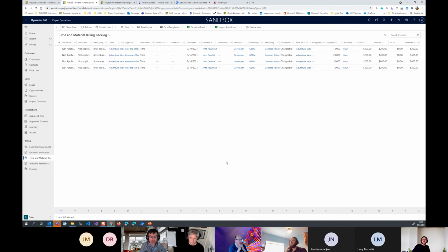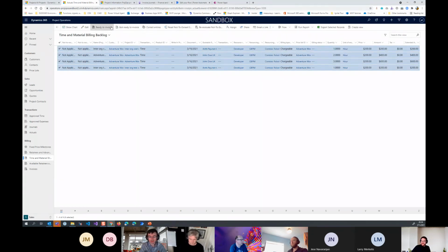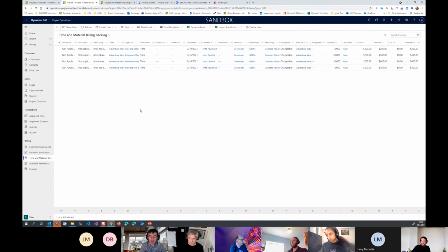Yeah, good questions. So what we want to bill per se is defined by the billing backlog, and we have that for fixed price. We have those for advances and retainers, for advance payments, and we have those for T&M, for time expense, as well as non-stock materials. So whatever I define here as ready to invoice or not ready to invoice will eventually be picked up on a Performa invoice when one is created.